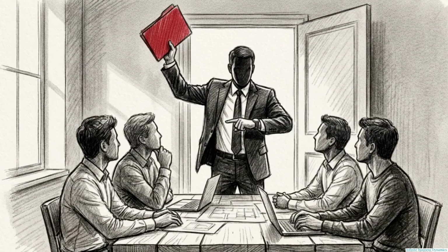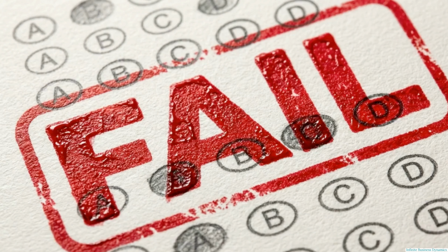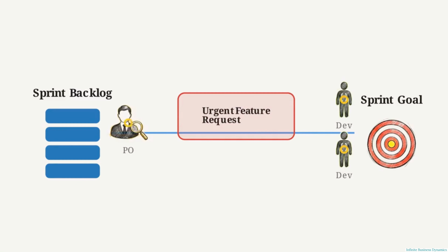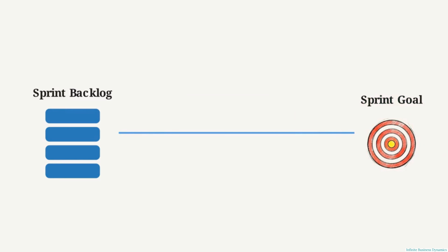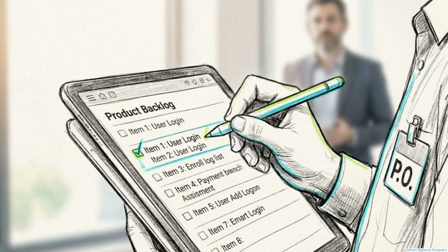If an executive storms in mid-sprint, demanding an immediate feature change, and the option suggests squeezing it in to keep the peace, that is an automatic failure. The proper protocol is for the product owner to sit down with the developers and evaluate the request to see if the sprint backlog can adapt without blowing up the existing sprint goal. The product owner is the sole decision maker for backlog ordering. Yielding that specific authority to external demands breaks the entire value delivery engine of Scrum.